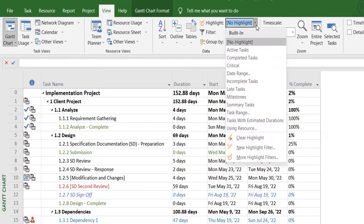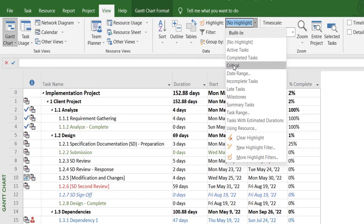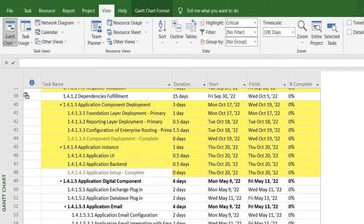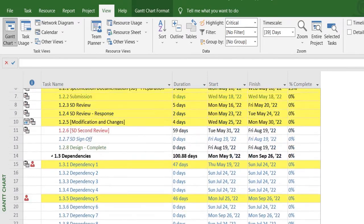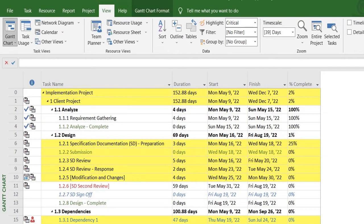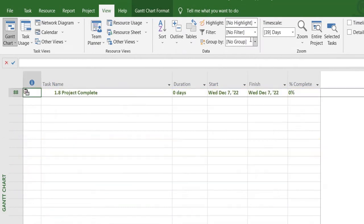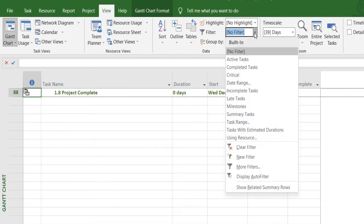One way of seeing it is by highlighting the critical task. If you select this drop-down, you'll see that there's a word 'Critical.' This is a pre-built filter, so once you select it, MS Project will highlight the tasks that are considered as critical tasks in the project. So that's the second way of doing it.